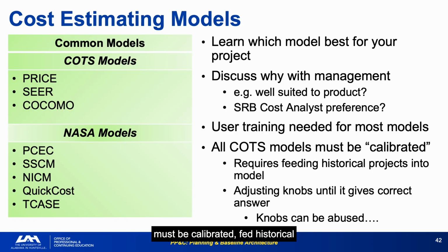All COTS models must be calibrated, fed historical project data from programs similar to yours, and validated to ensure they produce reasonable answers for your mission class before you use them for a JCL input. The failure mode of model misuse is subtle. It doesn't look like dishonesty. It looks like subjective input set to reasonable levels by people who have a stake in the estimate being low.